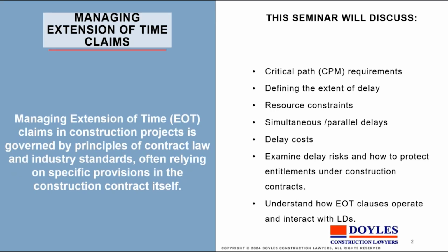So that's important when you're looking at critical path, because a critical path will often be a situation which is either agreed or adopted as a proper method of measuring the time on a construction project, but it may not be compulsory. That is, there may be a number of ways that you could complete the building and a number of sequences that you could employ. So you need to be alert to whether or not a particular model operates sensibly and favourably in your particular project.